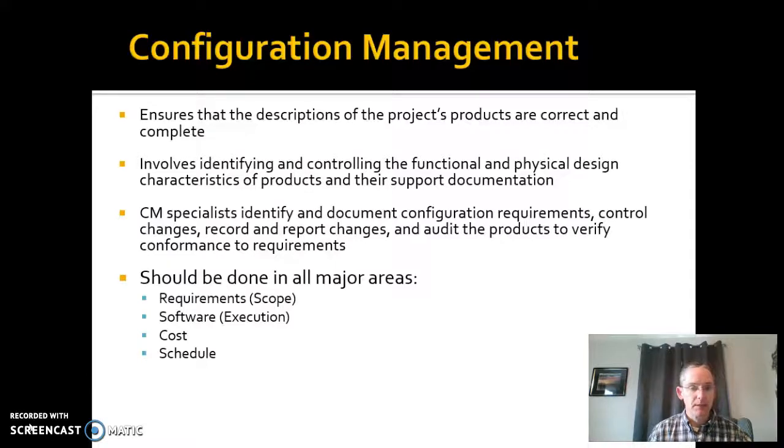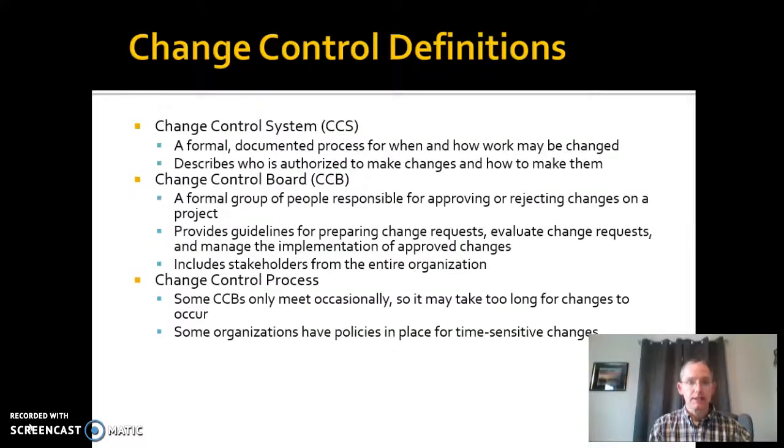Your configuration management specialists are going to be the people that identify and document the configuration changes, control those changes, record and report them, and then audit the products to make sure that we're actually conforming to what we said we were going to be conforming to in terms of the requirements. This has to be done in all the major areas. So like I said, scope, software, and in the execution phase, cost, and schedule all have to be under configuration management.